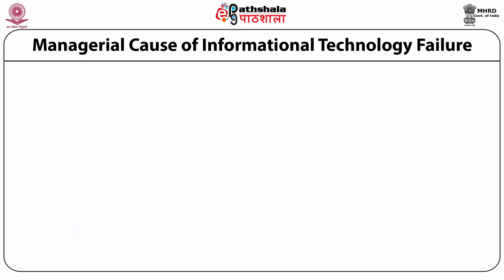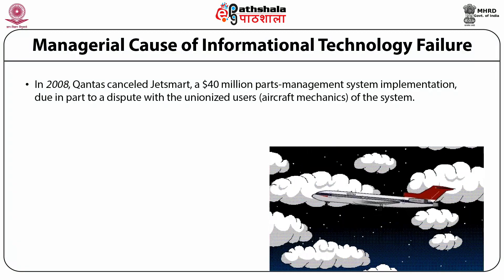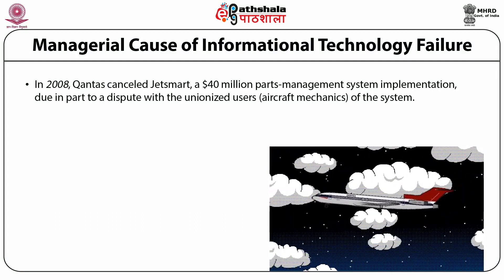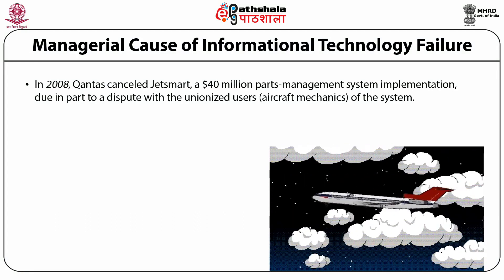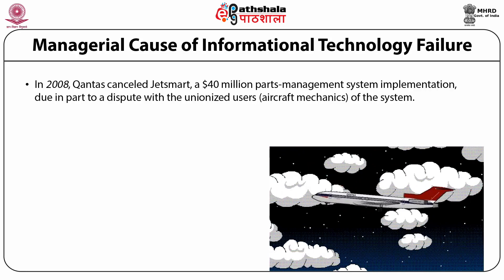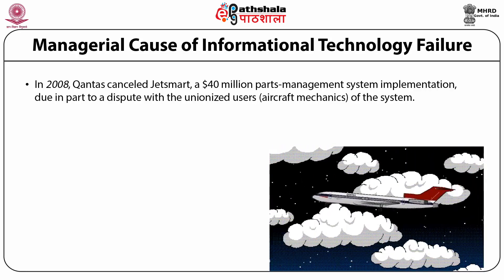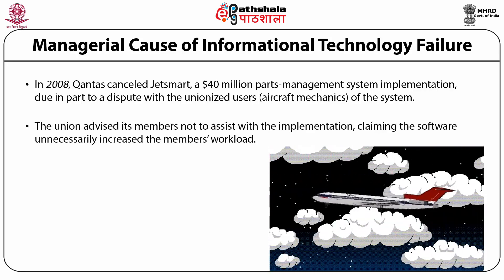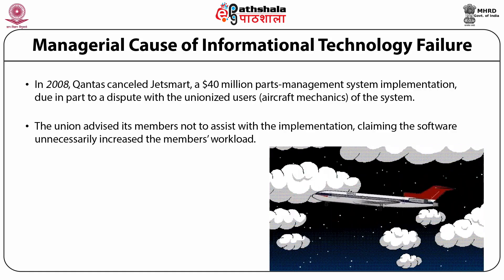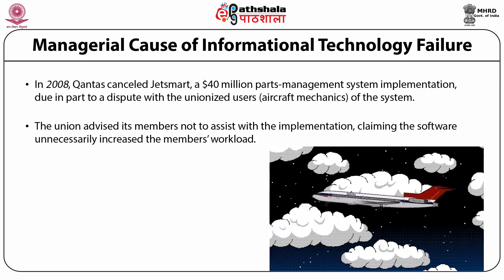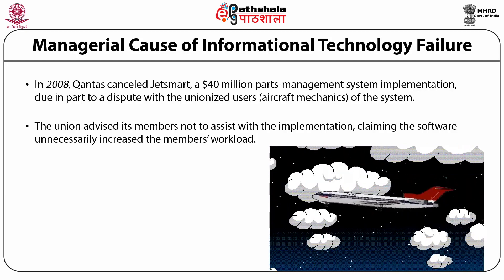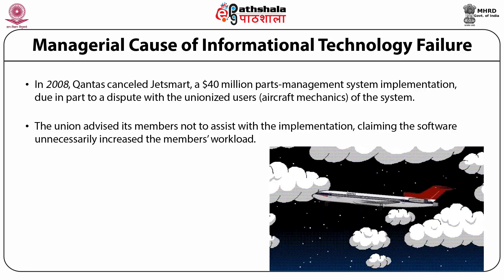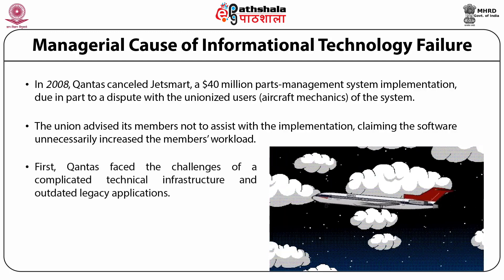Further, in 2008, Qantas cancelled Jet Smart, a $40 million parts management system implementation, due in part to a dispute with the unionized users — the aircraft mechanics. The union advised its members not to assist with the implementation, claiming that the software unnecessarily increased the members' workload.